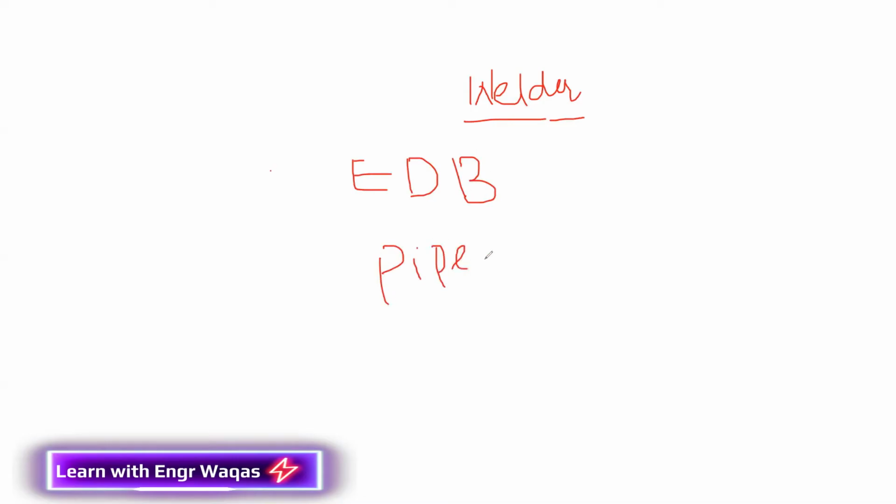of anything they are going to buy, like if there is material, or a welder, for example, it's not like you are going to make your own welder. You are going to hire your own welder, or hire a welder from a third party. But if I talk about the electrical perspective, there are electric DPs or distribution boards. There is piping material. There is any material you talk about in that. So make or buy: if your company is interested in installing your own plant to manufacture these things, you have to make an analysis because your company is going to make that thing.